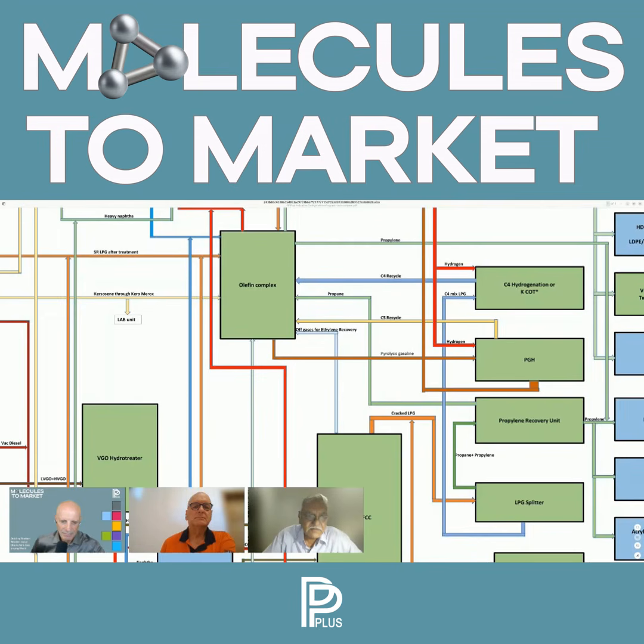The problem with petrochemicals is it is very difficult to get these fellows to quote. Our experience is very different about them. They don't quote in India. They don't offer technologies. They always come with the condition that they will either not part with the technology or come and make investment. They want to own the plant.